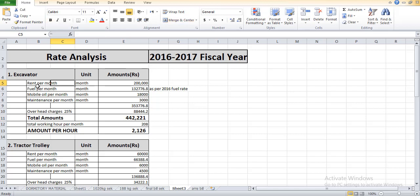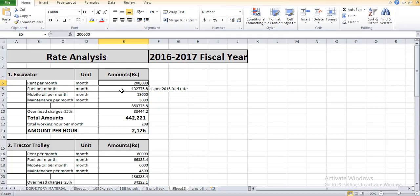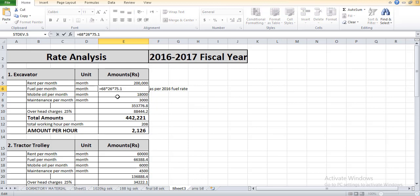According to 2016-17, the rate of excavator which we finalized with the excavator owner is 200,000 Pakistani rupees. The fuel required is calculated. Four days is exempted, Sunday is the holiday, so we consider 26 days for the month.